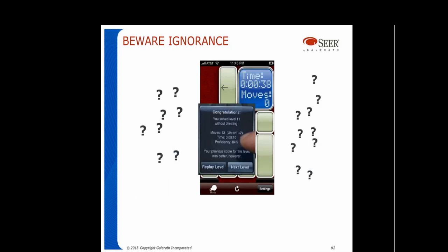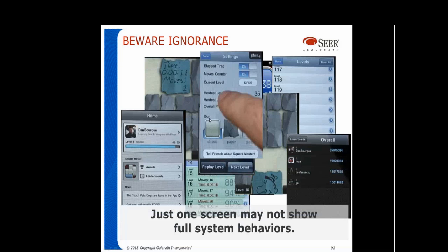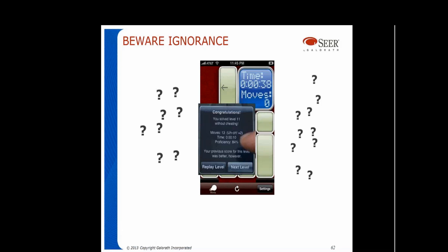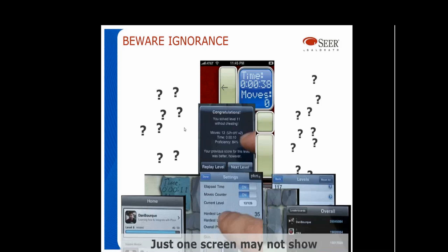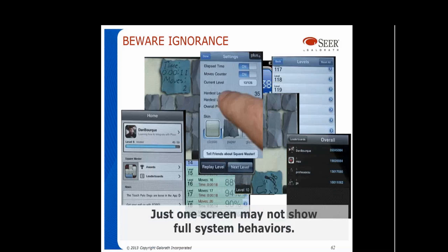User requirements are very important, and having a full set of requirements are very important. I made the mistake initially of thinking this was a simple application, but I looked it up, and I got addicted to it as well, playing it, and I found out that there was much more to this application than met the eye. I really needed to know all the requirements to count this. That one screen was the tip of the iceberg. These were all the screens involved in that one application. So you have to make sure that you have all the documents available to do a complete sizing.